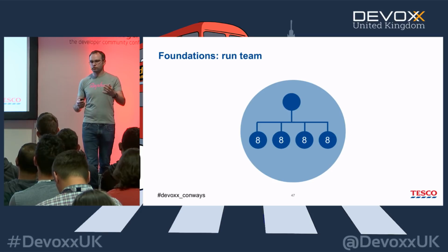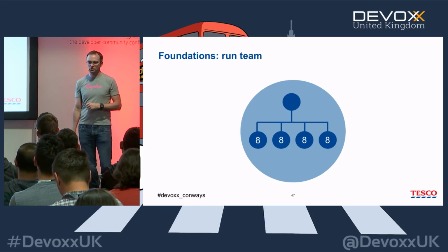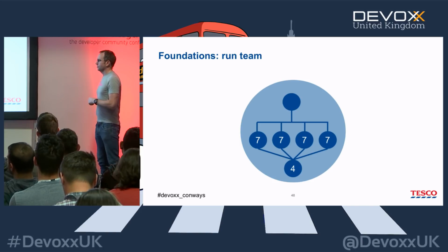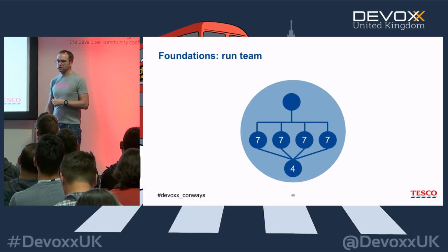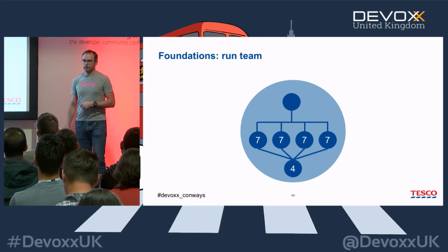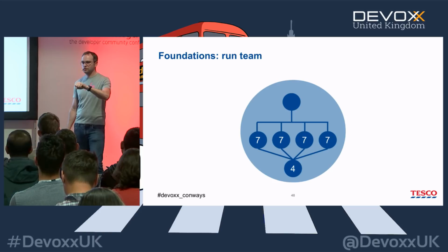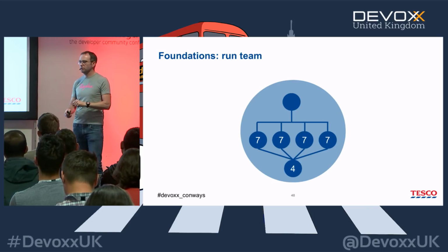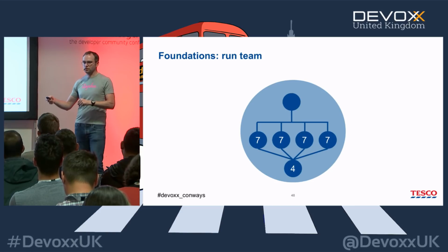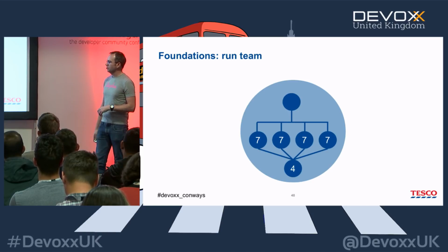We might call it technical debt. We're pretty bad at planning for that in amongst shiny new features. So what we do is essentially pay a team tax. So for any given period of time, and it rotates every 2 weeks, one person from each of those teams is donated to what we call the run team. And they're taken out of their product backlog. The product manager who's running it knows that they're going to have 7 people, not 8 people. And they come out for 2 weeks, and they spend that 2 weeks on a run team. And they build and run and support and operate and automate away burden and do the kind of things that you do in that kind of environment. And that works pretty well in our bounded context of around 36 people.